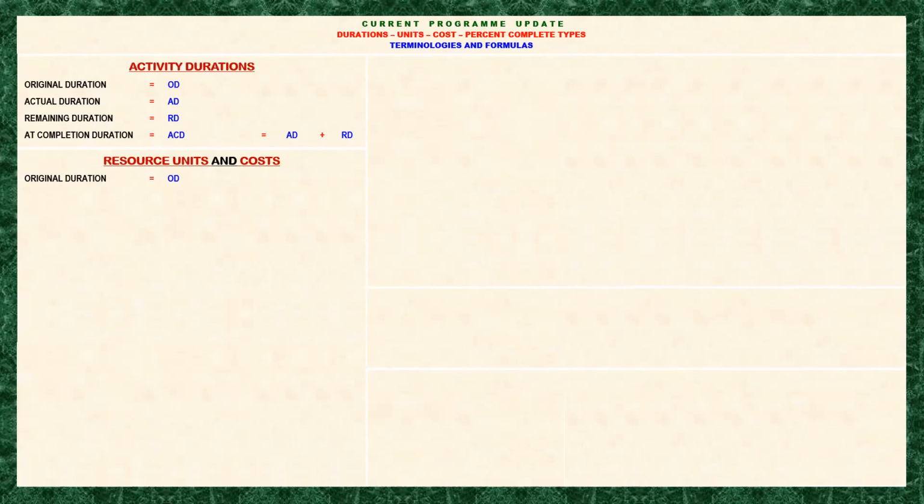Then after that, for a certain period of time, the roller will follow until the earthwork is complete for the whole duration. So when you sum up the duration of the excavator plus the grader plus the roller, you will come up to the total duration of the activity. Okay, I hope you understand.